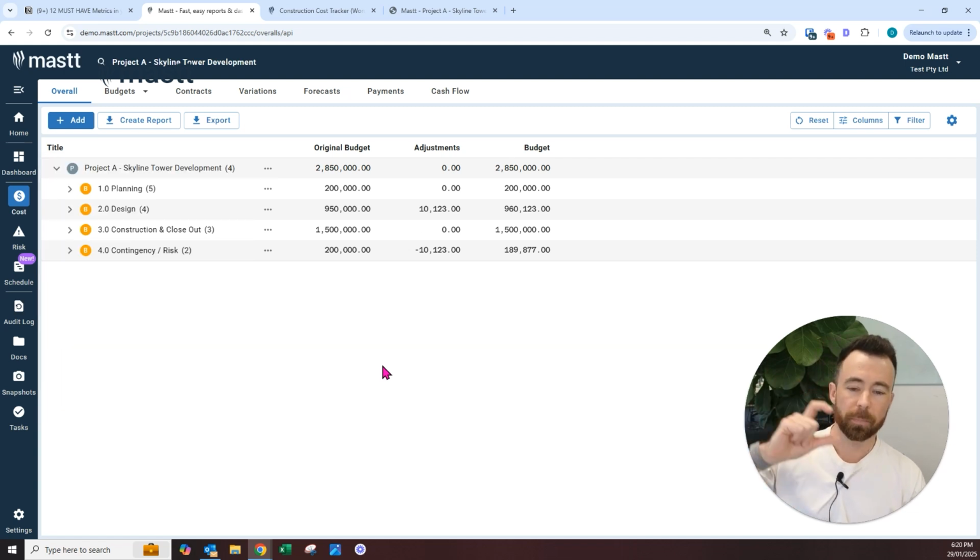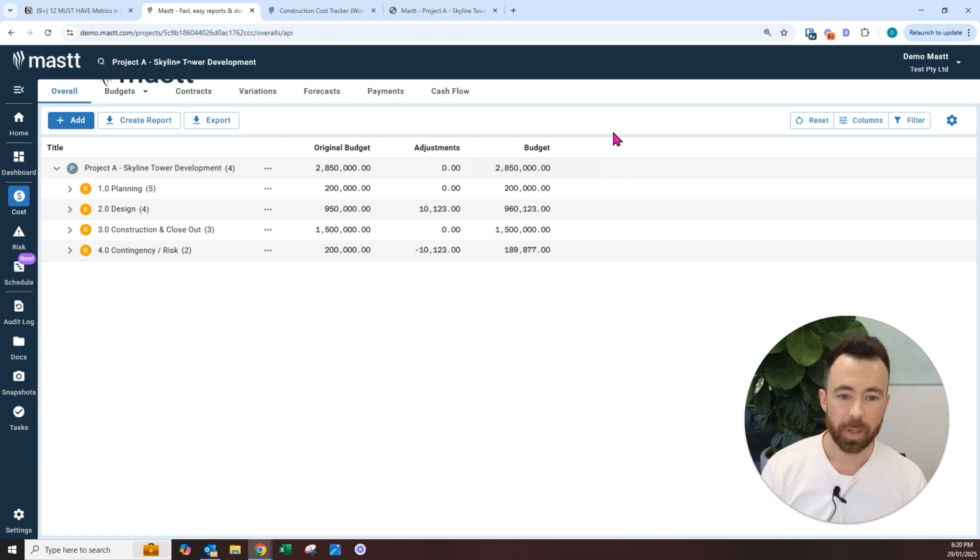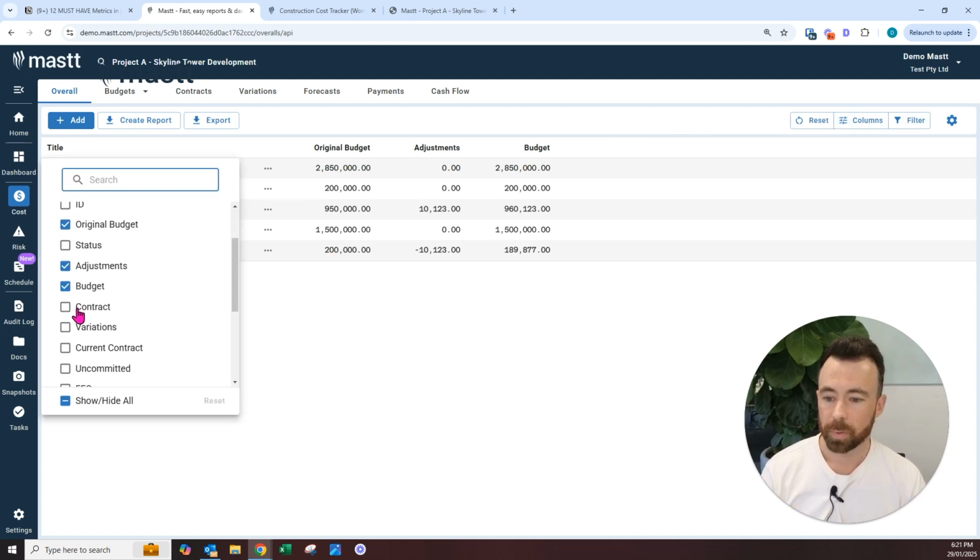When we move money from contingency into another budget, that might be a transfer, that might be a change. Either way, that movement of money needs to be tracked, and that will give us our current budget position, which is the original budget plus any adjustments that have been made. With an accurate budget position, we can now track and monitor the costs, the real world costs, the real-time costs, to get to a position of variance.